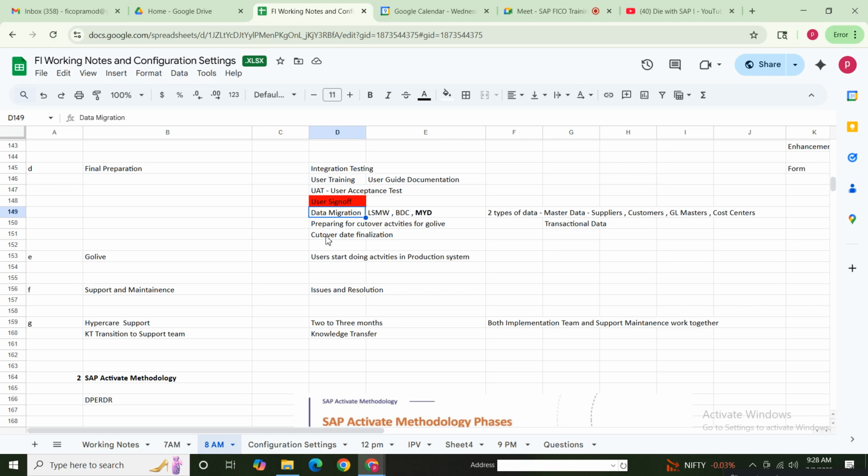For the business from the Verizon side, what will be the last date for using the Oracle system or Tally system from their side? And what will be your first date in the SAP system? On which date are you going to move to the SAP system? In between, some date should be there, right? Cutover date. You will stop all business activities in your existing system, Tally or Oracle system. You will decide some cutover date over there. Okay, then you will move your data to the SAP system.